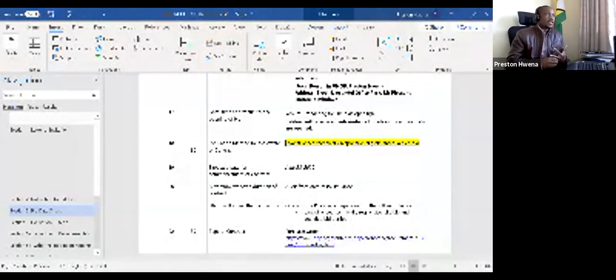So delivery timeline will be critical. You find that those who have ready available stocks tend to benefit more than those who talk about a 30 days delivery period, because I don't know what will happen in the next 30 days, especially with the number of people testing positive to COVID increasing each and every day.